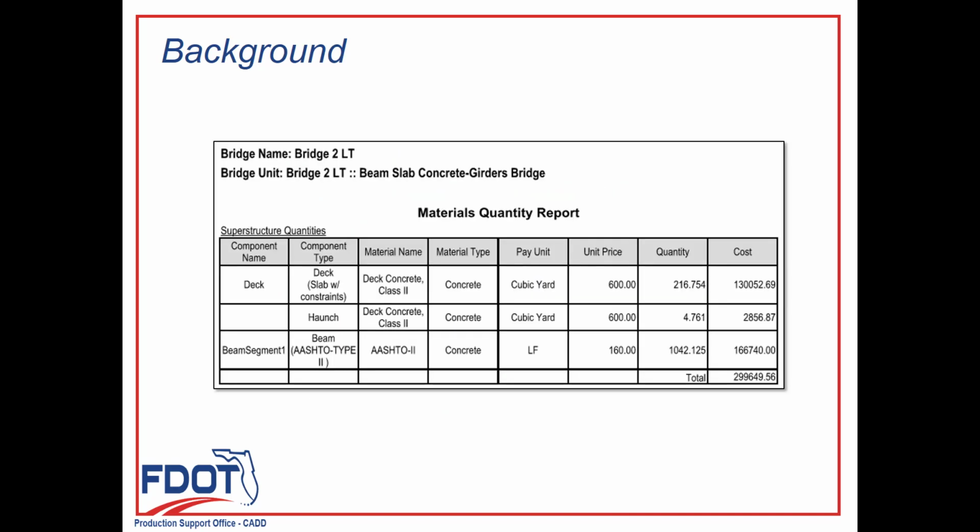Specifically, on the material quantity reports, make sure that you have properly assigned the feature definitions and that you use the correct templates and material types when creating a model. This will help you create a more accurate quantity report.